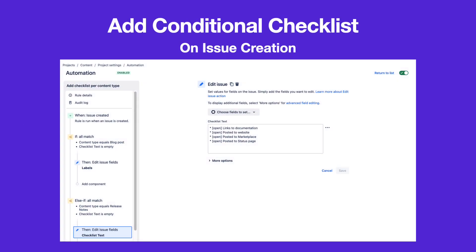You can use JIRA automation to add any of several checklists to an issue depending on a field value. This allows you to specify different steps or criteria without creating multiple issue types.